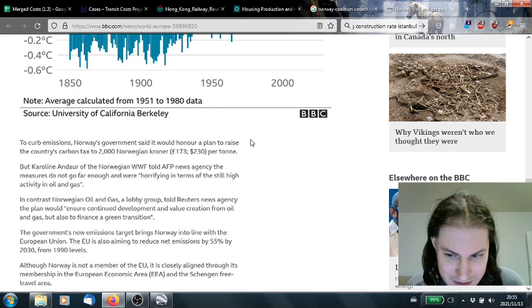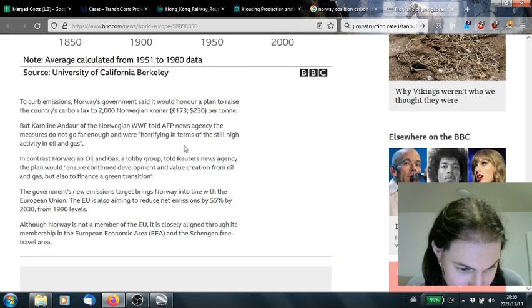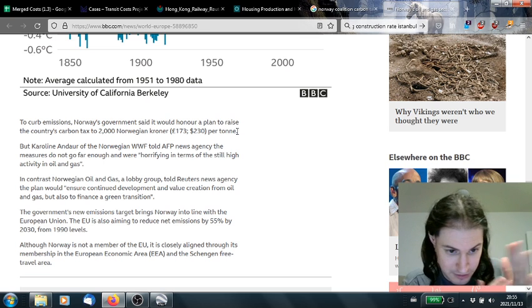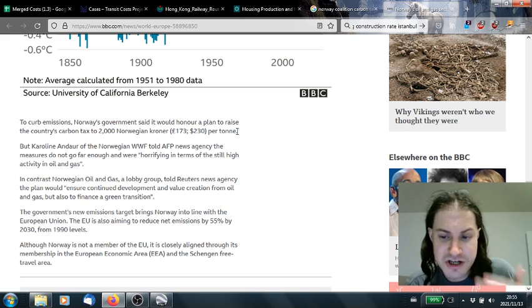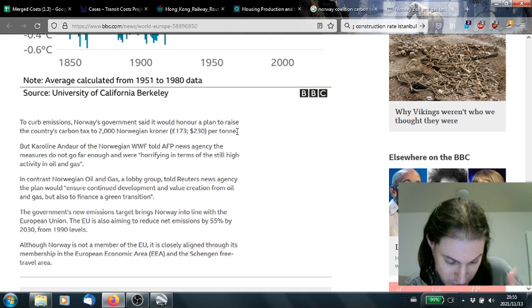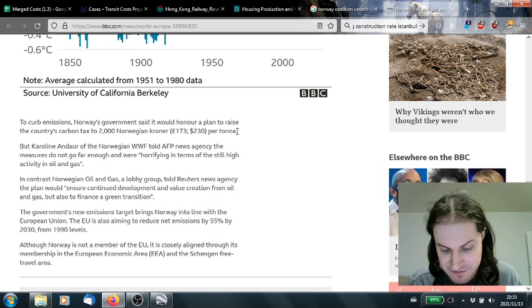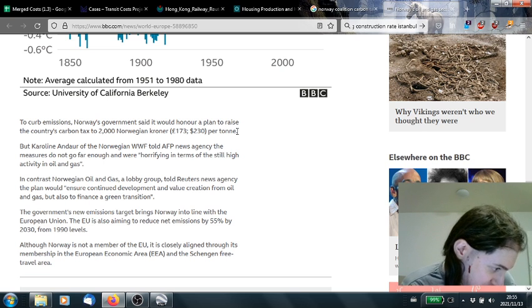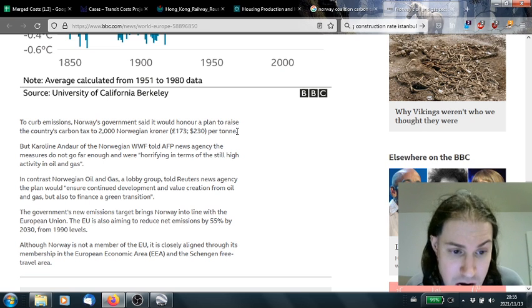So, as you can see, green activists still want more, and instead of raising this in Sweden, maybe they tried to pass some dumb environmental laws that I'm sure made sense to whoever was proposing them, and they just didn't think through, and that's how the cost rose. So generally, when you pass new regulations, especially if they're going to be relevant to an ongoing project, maybe it's a good idea to price the consequences of the regulation into the cost of the regulation, which I don't think they did in Sweden.